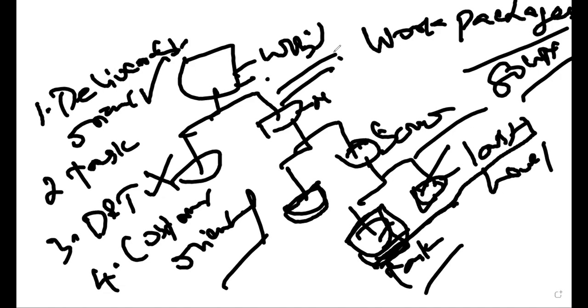So which documents are integrated in the established scope baseline? We have our approved scope statement. The second one is your WBS. The third one is the WBS dictionary, a technical document that supports each and every WBS component with a lot of information. The fourth one is the lowest level, the last level of a WBS component, which is your work package level. What is the fifth document? Please note it down. The fifth document integrated in the established scope baseline is called the planning package.